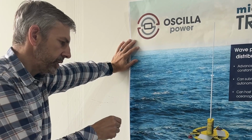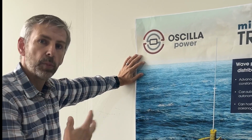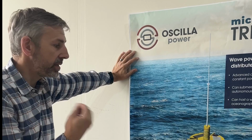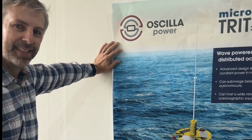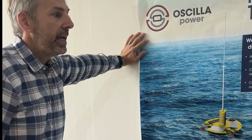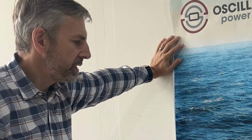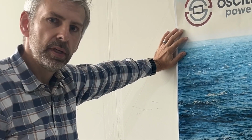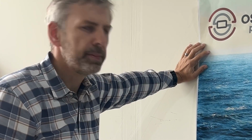The big challenge is permits. So the location where it's going to go is about 13 miles offshore of Cape Hatteras in North Carolina. The permits haven't come through yet, so we have to wait until they come through before we can do the deployment. But we are told that they're getting close. I think that's a theme on my channel, is that so much of the decarbonization challenges are permits. It's true, more than finances or technology. And it's all about risk. When you've got something new and untested and where the impacts are unknown in the ocean, in a protected space, you have to be extra sensitive about some of these things. So it's understandable, but it is frustrating.